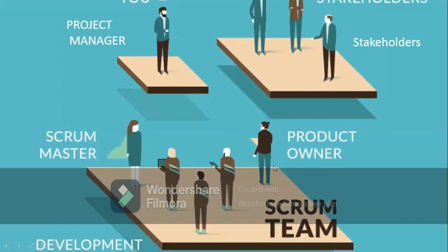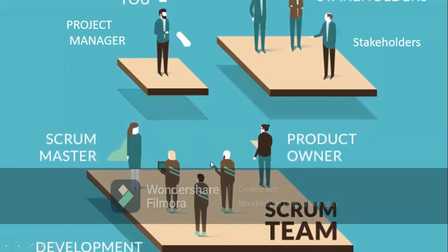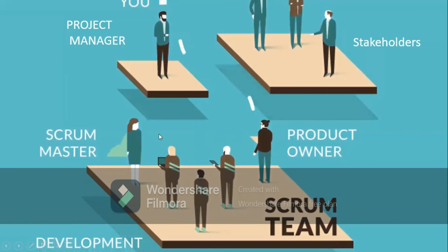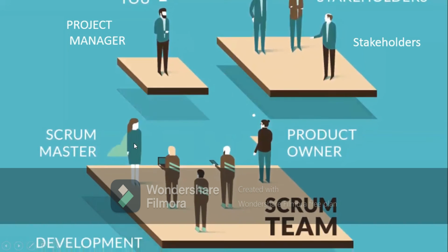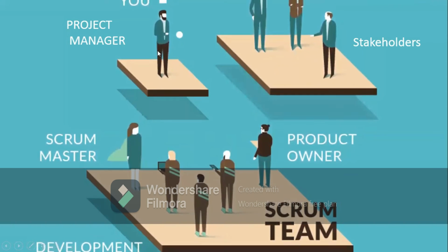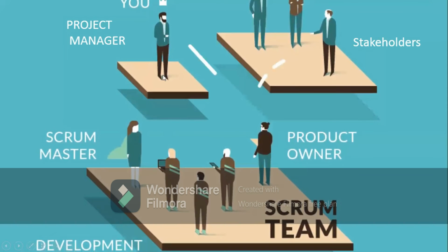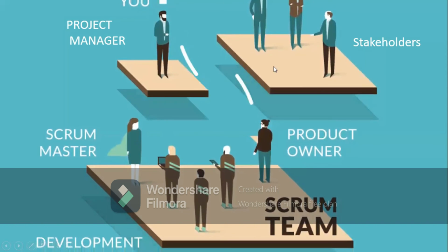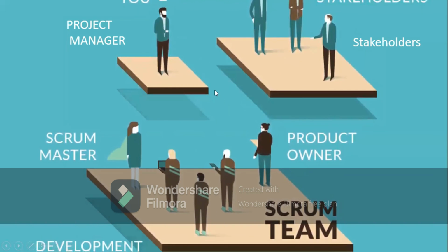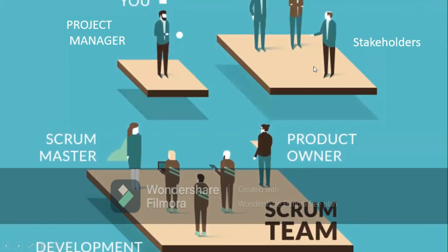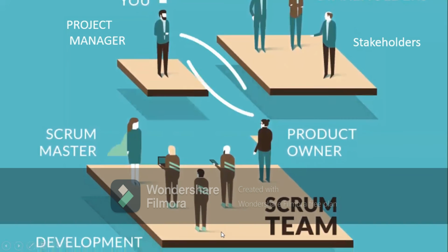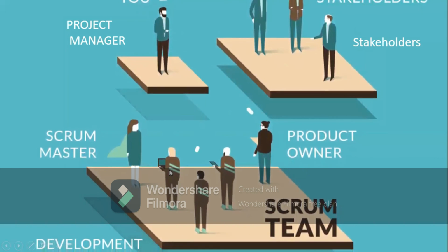Who directs and manages the team and provides facilitation to the development team and the QC teams, and as well engages in the sprint review meeting and the stand-up meeting with the team, and reports back to the project management on the progress they're performing, right? And the project management faces the business side with the stakeholders of the project and says how things are going, how things are delivering, and what the forecast, the status, and the progress reports are, which have been fed up from the Scrum team, okay?